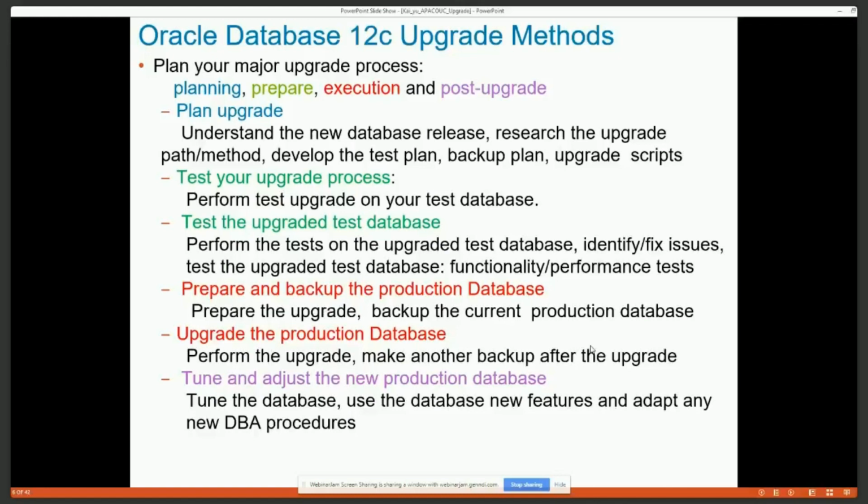So it is important for the DBA to plan this upgrade ahead. I put this in four different phases, starting with planning. During the planning, you need to fully understand some new features of the database and research the direct or indirect path to upgrade, and develop your test plan.